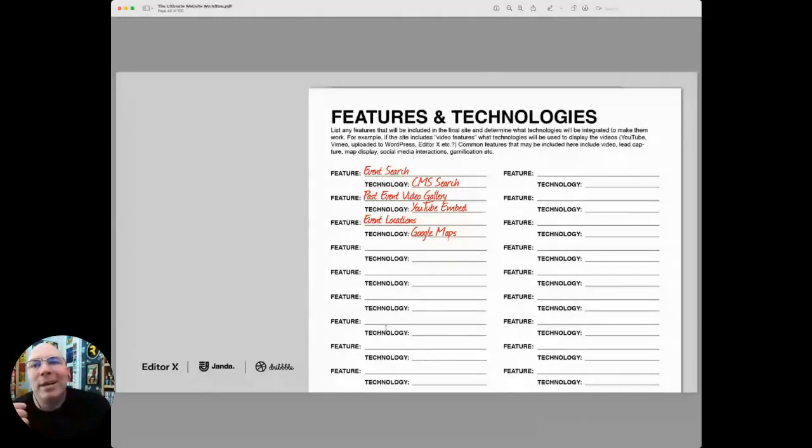So our developers went in and they had to custom code a bunch of stuff on top of the Google Map API, and it became this super expensive $10,000 production cost tool because I didn't identify clearly how we were going to build that feature. This kind of thing happens. And so identifying the features and the technologies that we're going to use is so critical. And I'm going to give you a couple of clauses that you can put in your contract that protect you from the changing scope of these feature sets that people ask for.